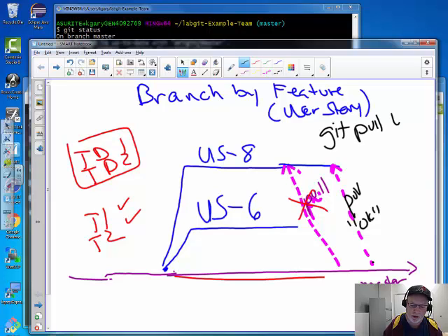Okay, so this is a branch by feature, and it's going to be using what's called the Git pull workflow. I posted some links, but you could Google the Git pull workflow. It's fairly common. This is a common practice. Doesn't mean it's necessarily the best practice, but it's very straightforward. You're branching by each user story. When a user story is complete, you're effectively going to the rest of the team and saying, we want to make this part of the product, and the rest of the team has to collectively agree that, yes, it met the user story, passed the acceptance test, and the code itself has met the quality criteria, the quality policy for our project. So that's what the workflow looks like.